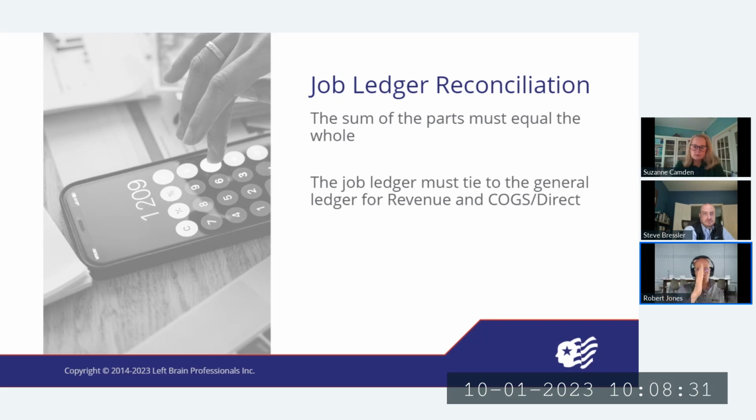So you would have job 1, job 2, job 3, and then in this last column, some expenses that were not assigned. That's a problem. Particularly when we're talking about the job ledger, and this applies to both revenue and whether you call it COGS or the direct expenses, that gross margin portion of the report should always have a job or a project associated with it.